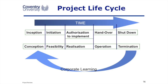Now, if your project takes three years, you can't wait until the end of the project to learn about the whole thing. So you may have a little learning event at the end of the initiation phase or at the end of the planning phase — learning events such that the company gets better at running their projects: learning from the risks, learning from the estimates, learning which suppliers to use or not use, which contractors are good, which contractors are bad.